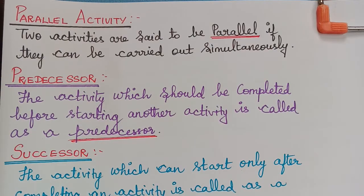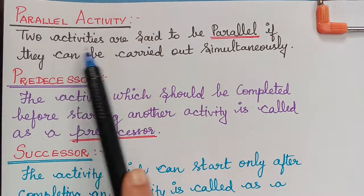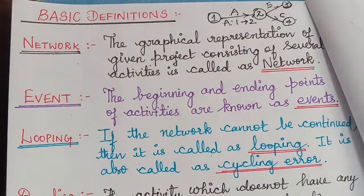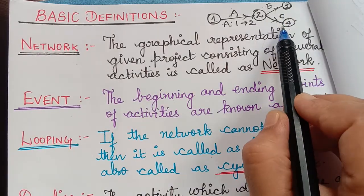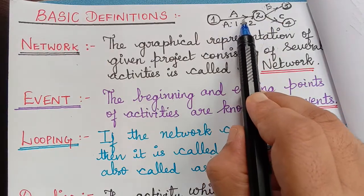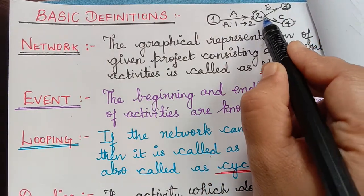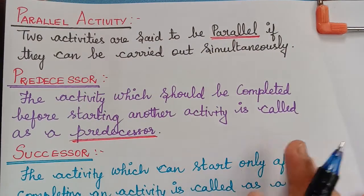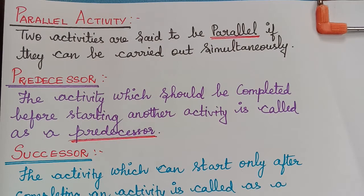Now here we have some more definitions. Parallel activity: two activities are said to be parallel if they can be carried out simultaneously. In the diagram, activity B and activity C are parallel to one another because they can be carried out simultaneously after completing activity A. We can have more parallel activities as well. For example, while constructing a building, the foundation work and the digging of a well can be carried out simultaneously — those two become parallel activities.